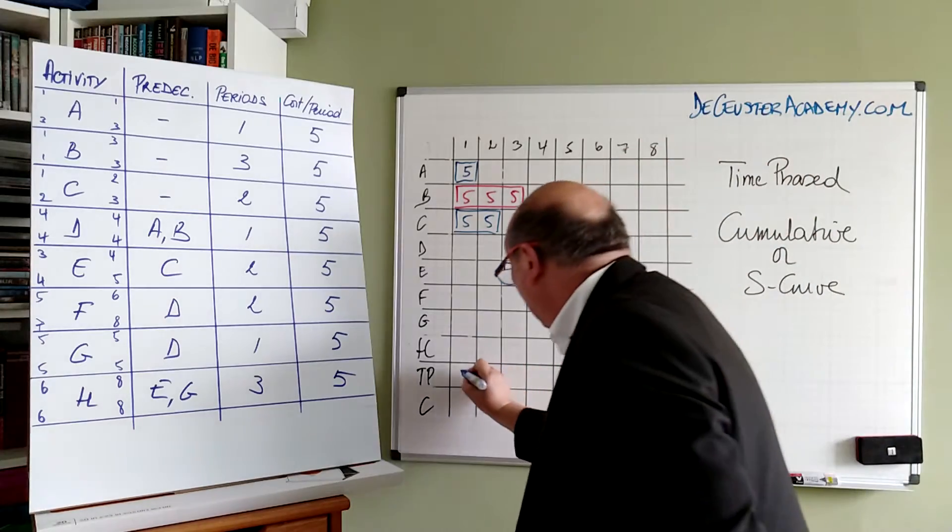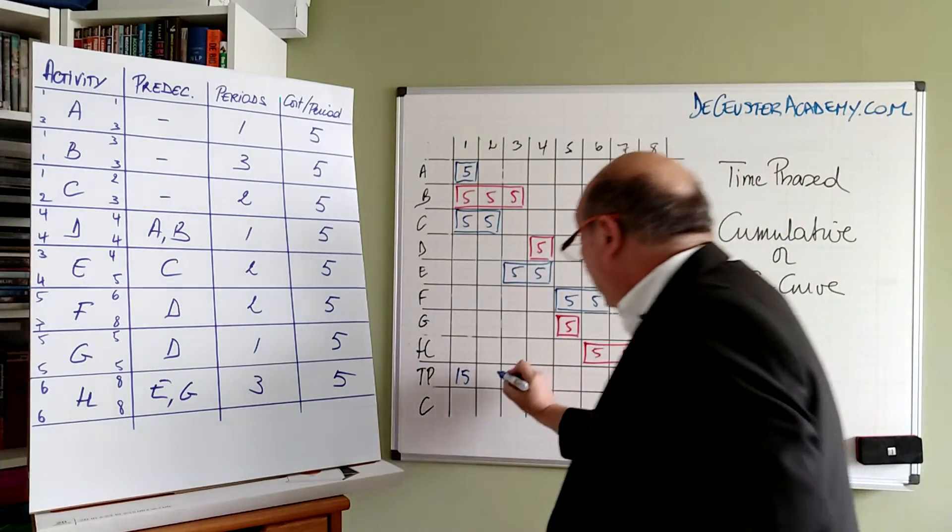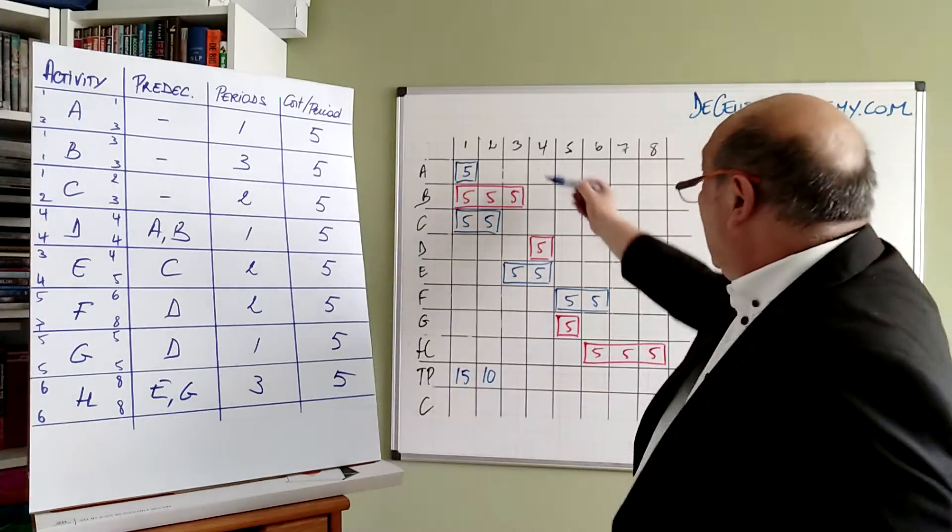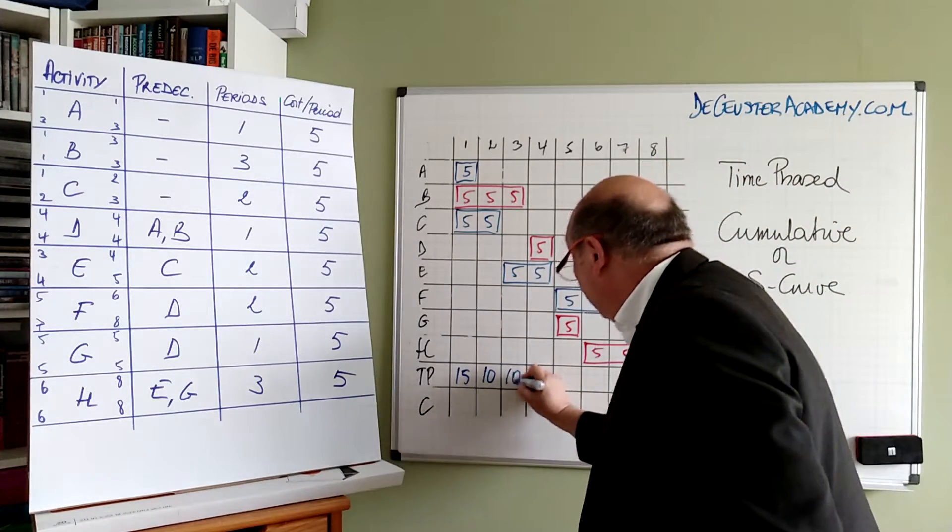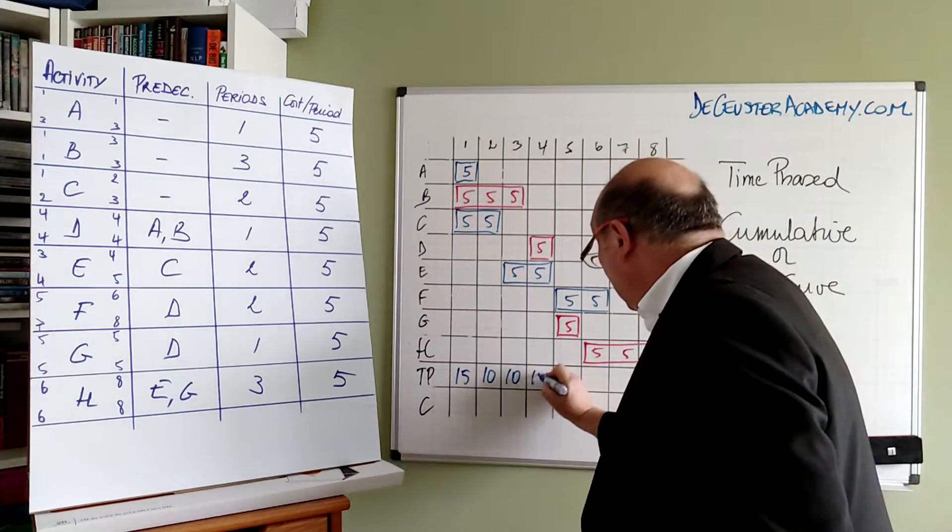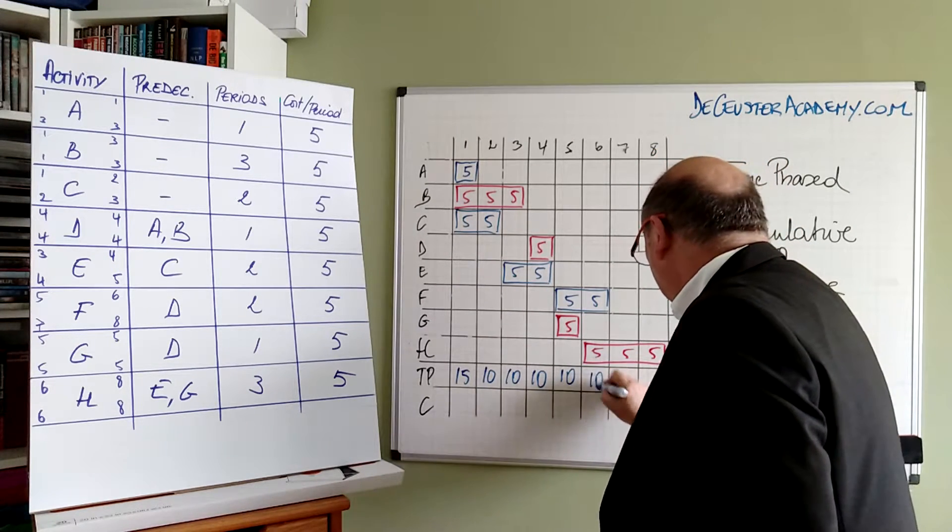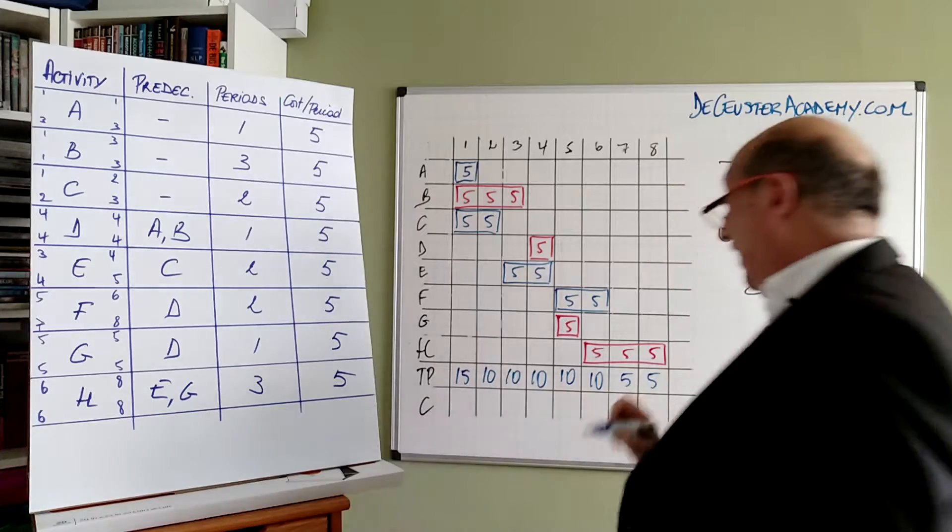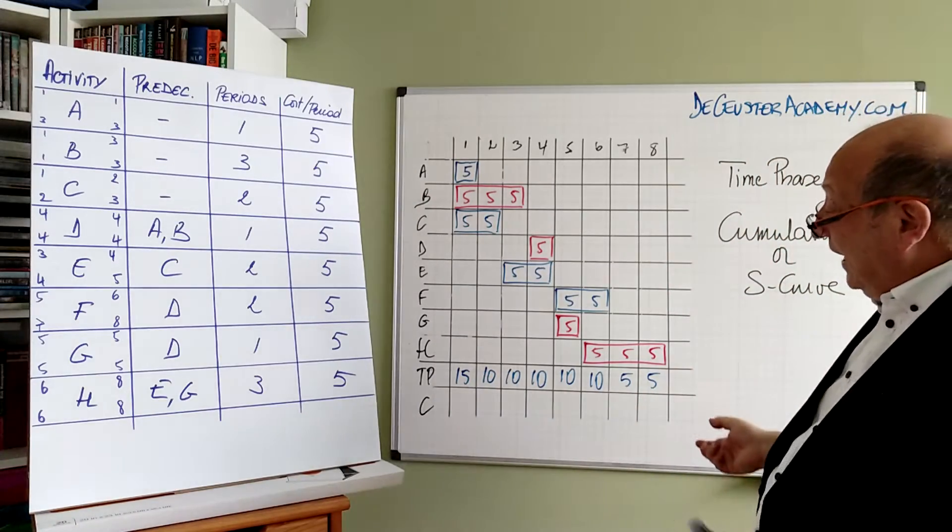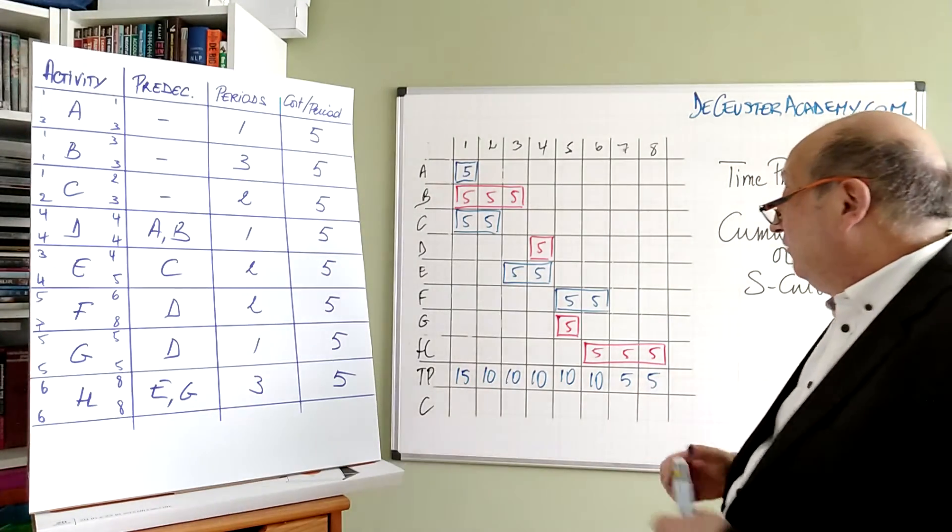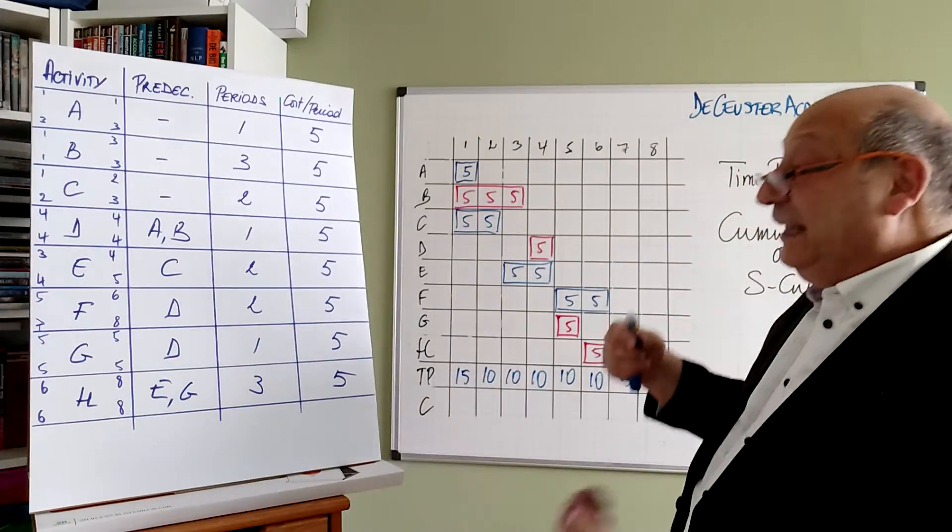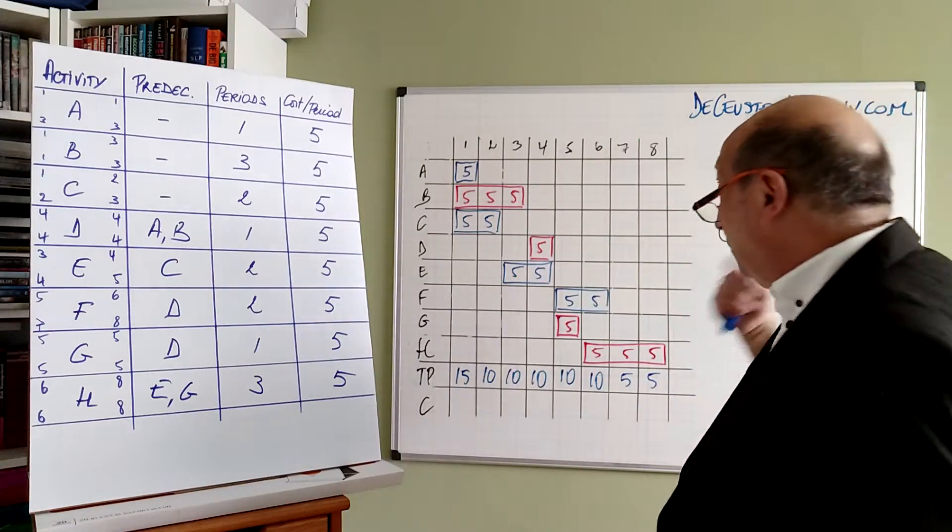So here I have 15, here I have 10, here I have 10, here I have 10, 10, 10, 10, 5, and finally 5. Now I can calculate the cumulative budget where I'm adding the new period to all the previous ones.